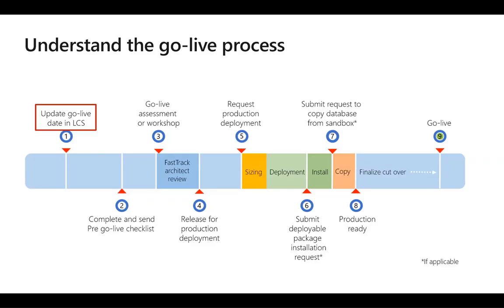We need to start this step at the latest 2 to 3 months prior to go live. We need to closely engage with customer key stakeholders during this period in case anything unusual happens.